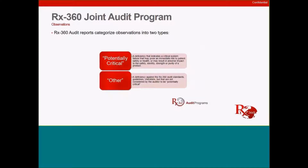The Rx-360 Joint Audit Program Observations. Rx-360 audit reports categorize observations in 2 types, potentially critical or other. With the potential critical, within 24 hours, BSI will contact us and let us know if there's any critical findings, and we will then contact any sponsors of that audit, letting them know.